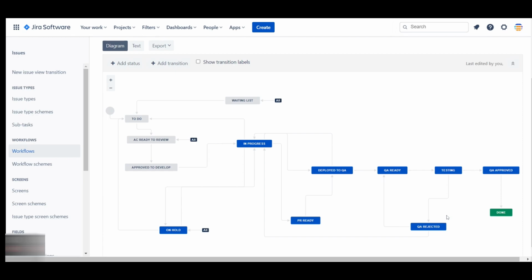Now there are different ways to handle that. You could move the story out into a different sprint and just handle it there when you fix that bug. Or you could find another way to handle it. Maybe move that acceptance criteria out and make another story for it so the rest of the story can be closed. There's a number of ways that you can handle that so you don't end up having stories open or pulling forward too many big stories into other sprints. It's a challenge to manage, but this is just one of the things where you have to use your analytical skills, right? And your Scrum Master skills.